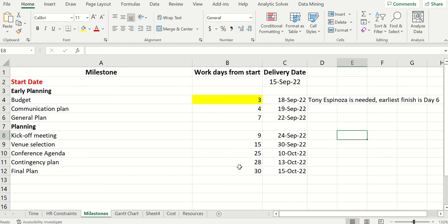However, these are the milestones we're going to miss. And the boss is going to have to look down at this and say, no, no, no, there's a problem. You know, the boss may tell you, go tell Tony that he's authorized to work more hours for you this week or whatever else, okay? So again, now you're going through, checking out your milestones, highlighting the ones that are problems so that you can go back to the boss.